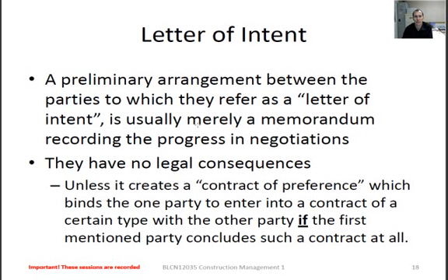Usually we don't let the guys start on site until they give us a copy of their insurances and all their up-to-date Incolink and WorkSafe documents and all those sorts of things. The other way of doing it is also to hold a bank guarantee as retention against them right from day dot. Yeah, I would also go that route.